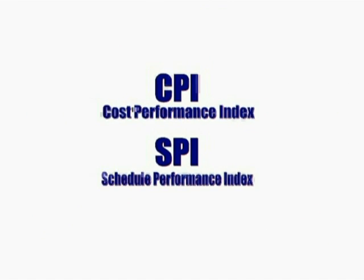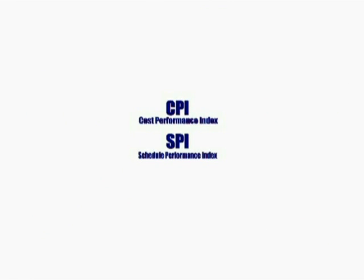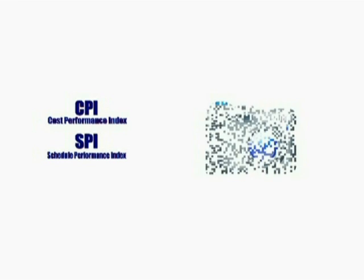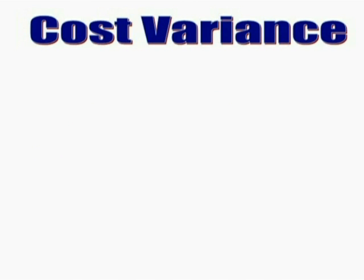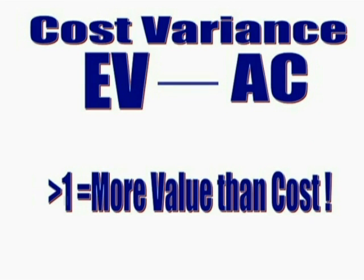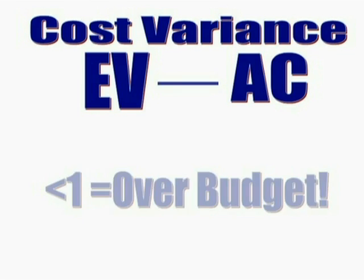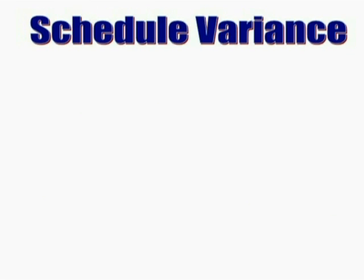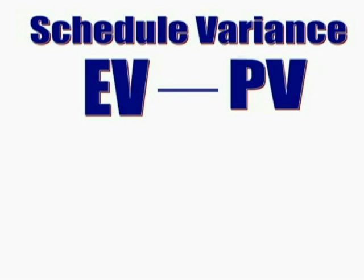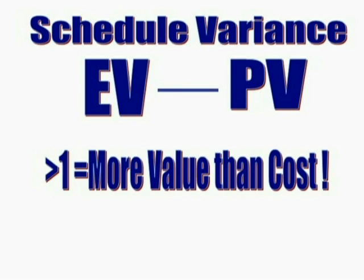The CPI and SPI snapshot tell you where you currently are, but we can also calculate variances for cost and schedule. Earned value minus actual cost shows the cost variance — positive is good, meaning more value has been produced than it costs to accomplish the work. A negative value indicates the opposite. Subtracting the planned value from the earned value gives you the schedule variance. Since planned value is an expression of time in dollars, positive schedule variance is good — it shows more value earned than planned.